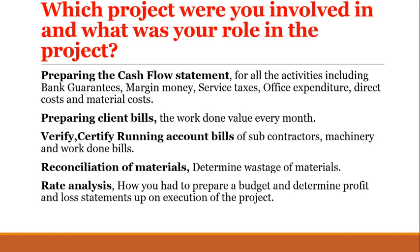Which project were you involved in and what was your role? Preparing the cash flow statement for all activities including bank guarantees, margin money, service taxes, office expenditure, direct costs, and material costs. Preparing client bills and work done value every month. Verifying and certifying running account bills of subcontractors, machinery, and work done bills. Reconciliation of materials, determining wastage, rate analysis, budget preparation, and profit and loss statements upon execution of the project.